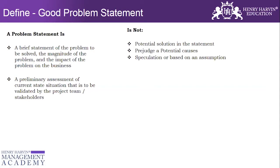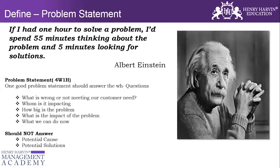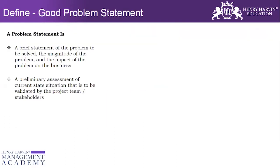What are the things we should not mention in the problem statement? We should not mention the potential solution. If I have some hypothesis or think this could be the potential solution, I should hold it to myself because this is a Six Sigma project. We should also refrain from mentioning potential causes or any speculation based on assumption. A problem statement should only talk about the problem, and it should have four W and one H.